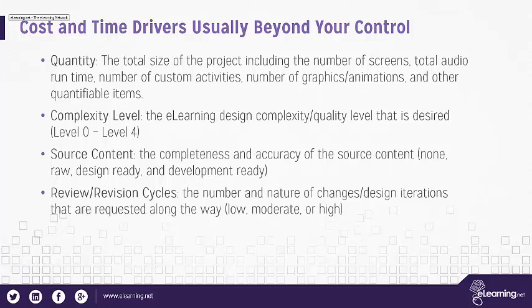And one of the ways that you can determine the total runtime is by looking at a script. So we highly recommend you write your scripts for your voice talents, and before you record them, you get those signed off, and that's going to be your course. If you take the word count of the script and divide it by 150 words per minute, you can come up with a pretty close runtime of your course. So if you have a 3,000 word count document, it's probably going to be somewhere in the neighborhood of 20 minutes, because 20 times 150 is 3,000. So that's how you could figure out the quantity and estimate that.